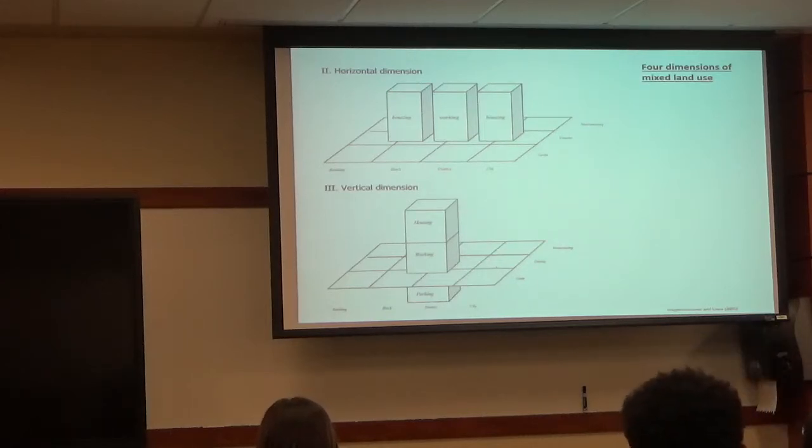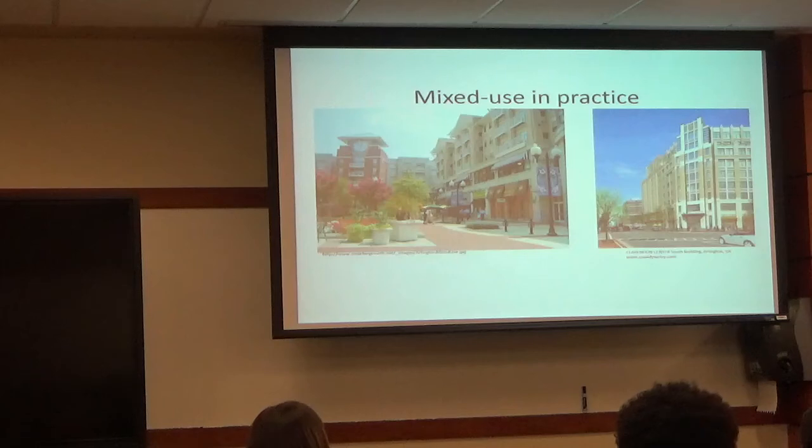Not really cool. Alright, so vertical dimension is a problem because you can't really stop building this whole thing. You've got to finish it, hopefully in one piece. Therefore your financing is different. The risk of financing is different. The returns wanted might be higher. Because people are saying, hey, you're going to put 8 floors up. You only make money on those condominiums and penthouse suites if you finish the whole building. Nobody wants to walk into a retail store or shopping lobby area while construction is still going on. Nobody's doing that.